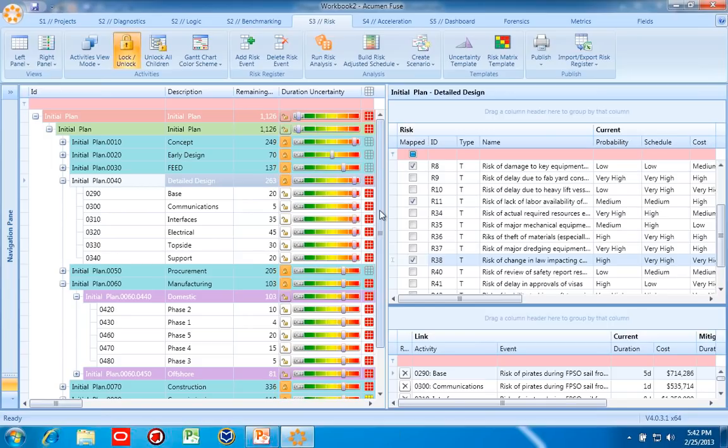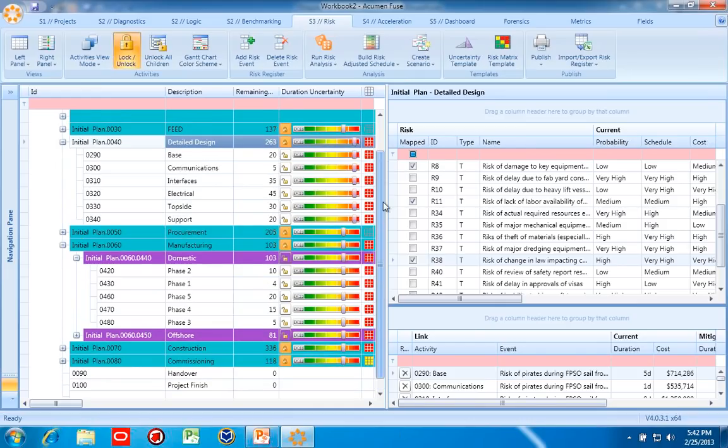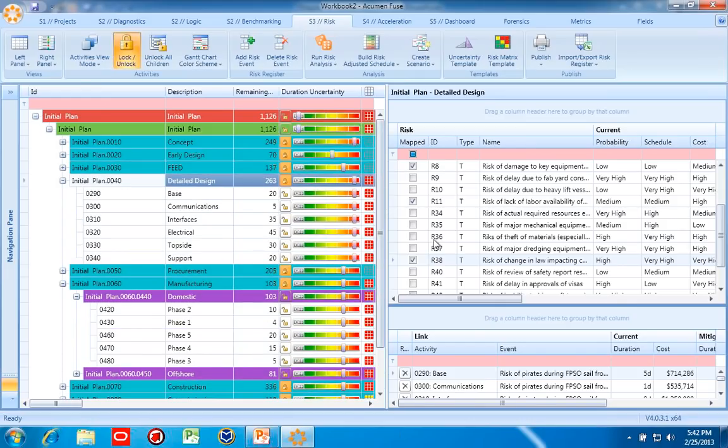So just as the quality of the schedule was important to enter this phase, the mapping between the scheduled tasks and the risk is vital to be accurate. This should be discussed and discussed again, just to be sure that these relationships are in place. Because if I'm missing one of these relationships and detailed design is not impacted by a high probability, high impact risk that it should be impacted by, the relationship won't be established.